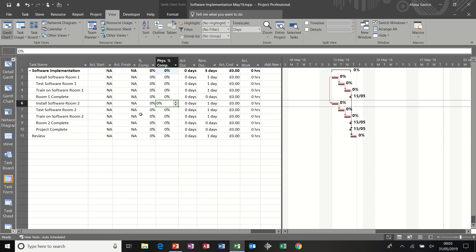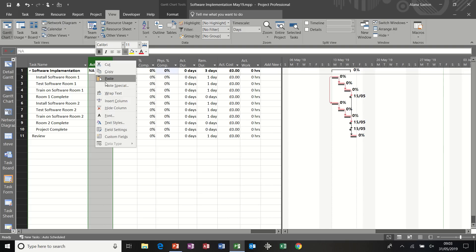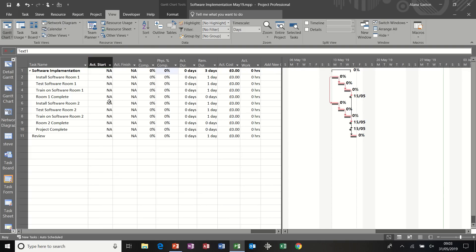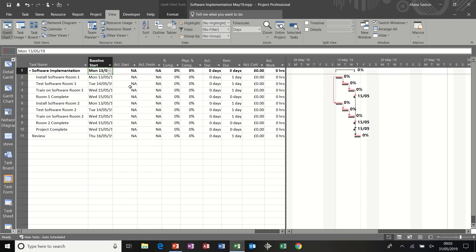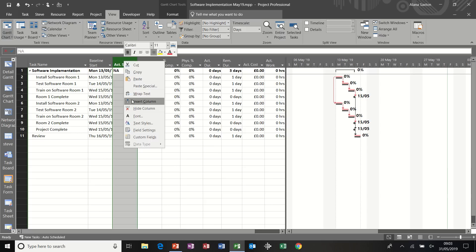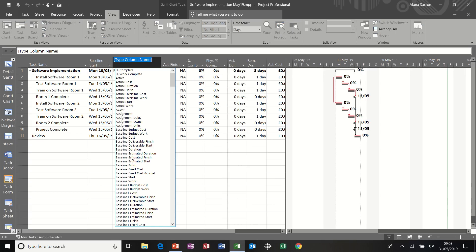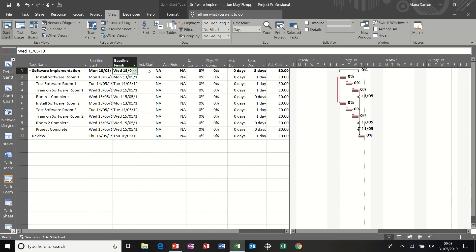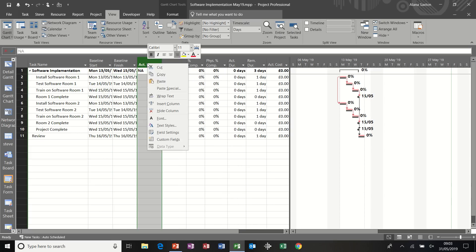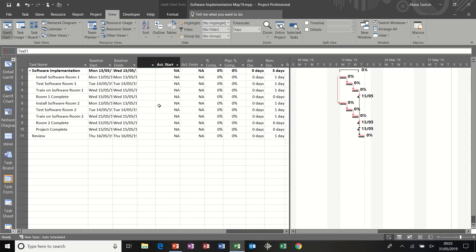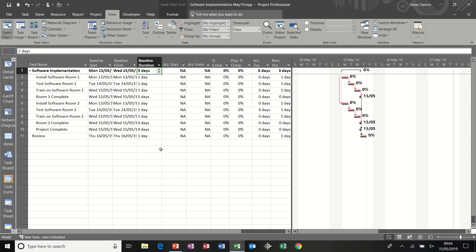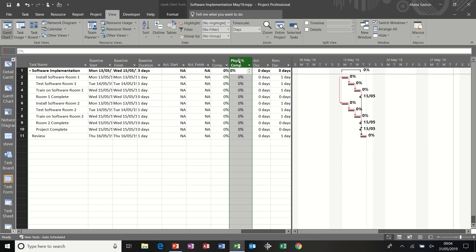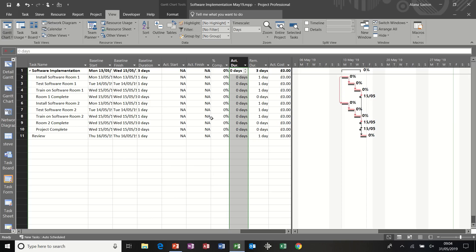Now, this isn't the only way that you can update a project plan, but it's the way that I teach in my classes and I think it's great. Now we've got actual start and actual finish and actual duration and other fields that you can see there. I'm just going to add the baseline start field. So baseline start. So I know when it was planned to start and baseline finish. Baseline finish. And then baseline duration columns. Baseline duration like so. So I've got an idea what the actual start date was or finish date was and the duration was. So I can utilize these. I'm just going to get rid of this column. And then I'm ready to go.